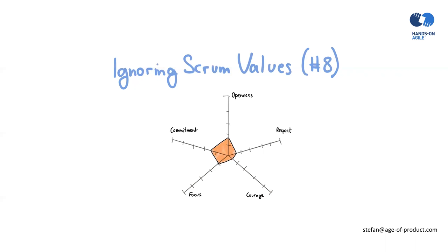And you have, again, to do this from day one, and you have to really keep track of this, and you have to push for this. You have to probably from time to time run a retrospective and feel the Scrum value beat of the team, creating these spider graphics, for example, and tracking over time how these values evolve. Then come to some action items with the team and figure out, okay, what can we do, for example, to improve the value of courage that we have here. If a Scrum Master is failing to do that, he's basically undermining all the other efforts that lead to building up trust with the stakeholders within the team and actually laying the groundwork to have a chance to continuously improve.